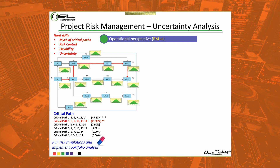If I am able to model the uncertainty around all these activities, I can quantify — and this is how quantitative techniques in risk management help. When I run the detail plan through simulation, it may show that the red critical path has only a 45% chance of occurrence. That means if you do something on that critical path to reduce risk, or if another activity increases in risk, the critical path changes immediately. Understanding the critical path is not enough — we need to quantify the probability of that critical path to support better decision making.